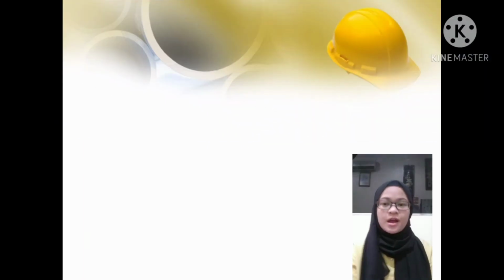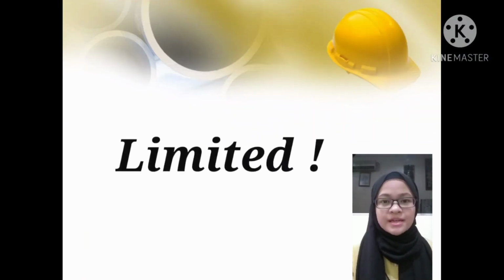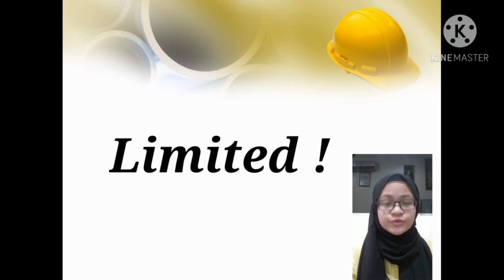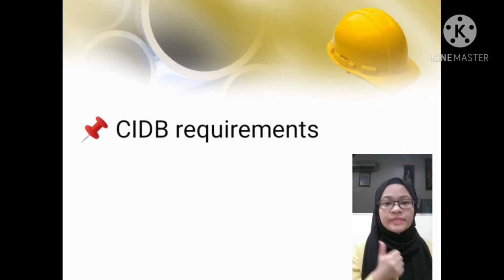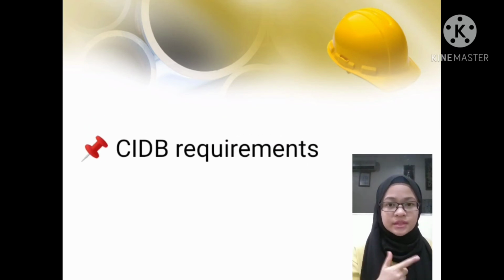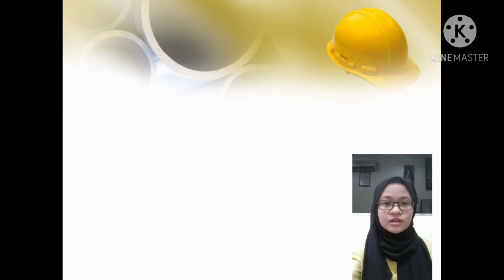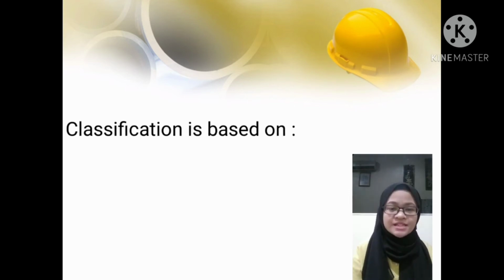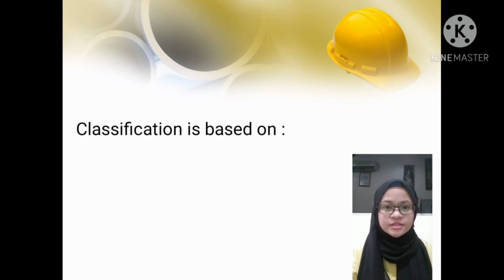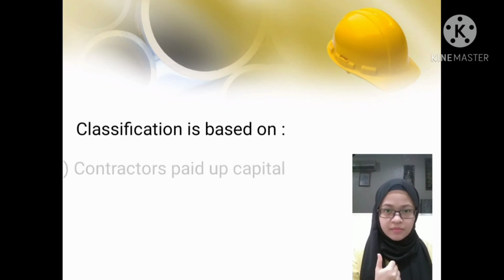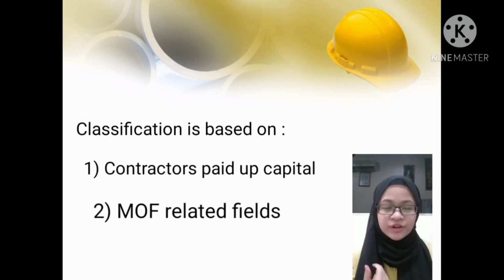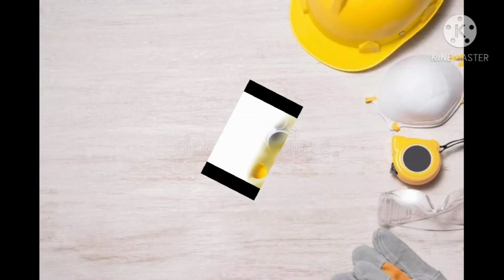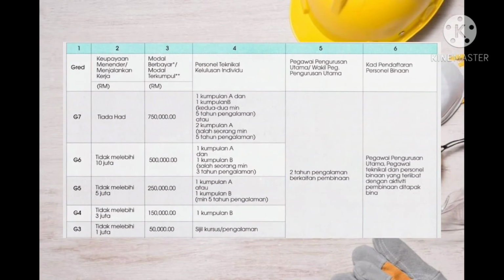Number 3, this tender document is a very limited offer to certain contractors based on the CIDB requirements and the estimated project cost. The classification is based on the contractor's paid-up capital and the MOF related field.